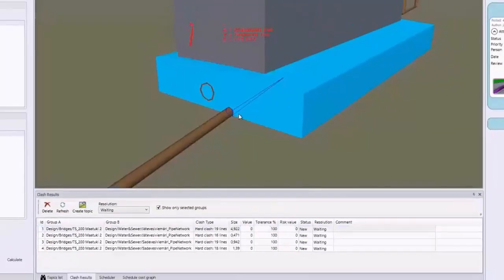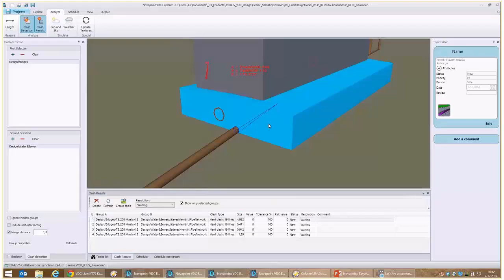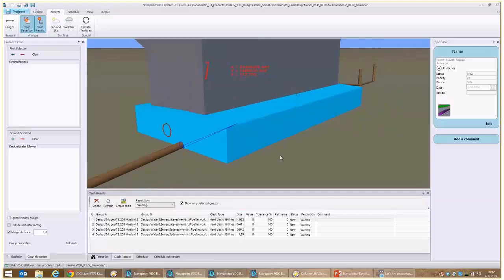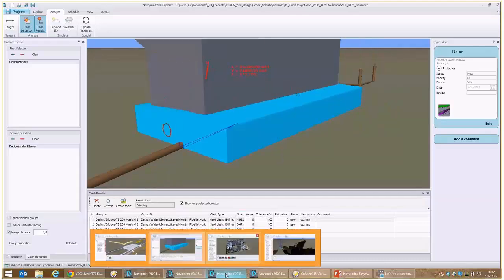So this is a very good tool in BIM using clash detection. In building construction, they say that each clash is $17,000 US. If you find a clash, you save $17,000 US on average. So clash detection is quite an important tool to reduce the costs.